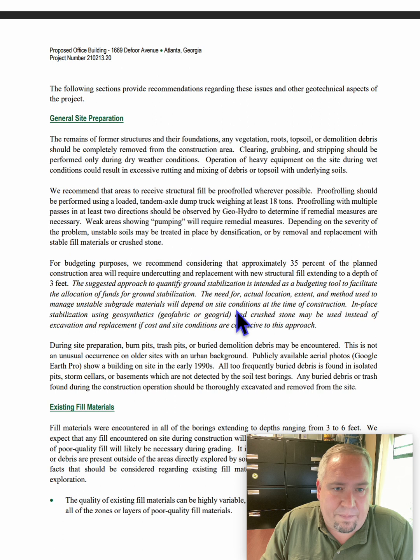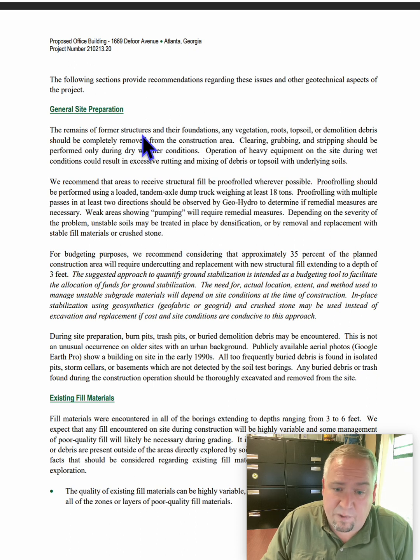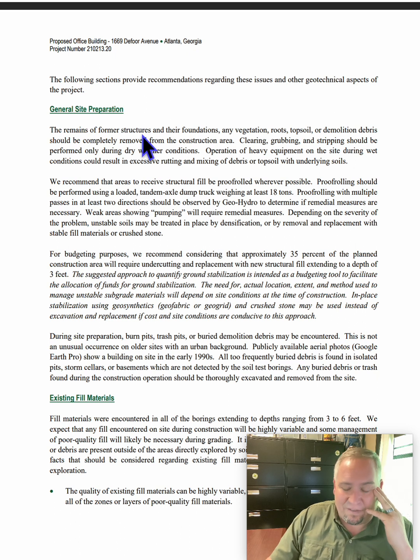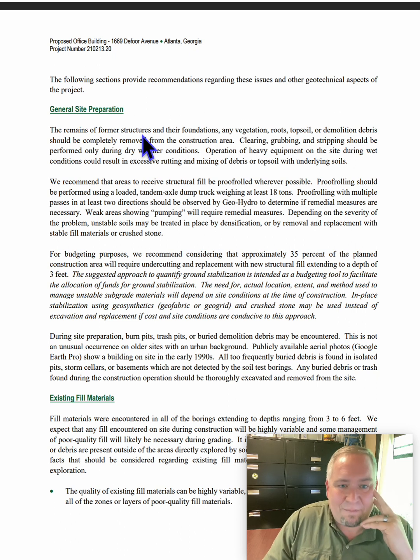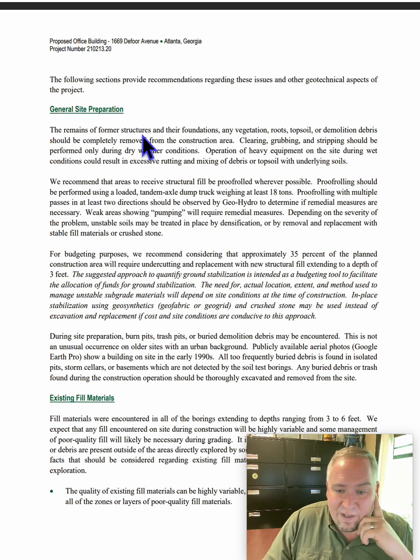General site prep. The remains of a former structure. Red flag right there. Somebody demoed something, but they didn't clean it all up, so we've got some remains. I can already tell you, I see that and hear that, and I'm going to say we're going to need a roll-off box. We're going to have to get rid of some debris, I'm sure. How much? I don't know. But I'm going to go ahead and call a roll-off company, get them on standby, and get a price worked out.